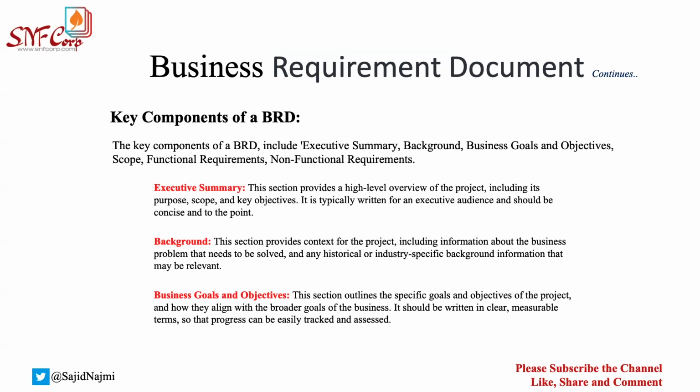Now you may ask, we are in the process of requirement gathering. How would we know how much time it is going to take? We don't know what the requirement is all about. We'll have to analyze things and see. That's true. It's a ballpark effort. It has like minus plus 75% variation, somewhere minus plus 50% variation, somewhere minus plus 25% variation. So you always have that variation in place when you're giving a high-level, helicopter view of these assessments of how long it's going to take. It's a ballpark effort, not a final effort.